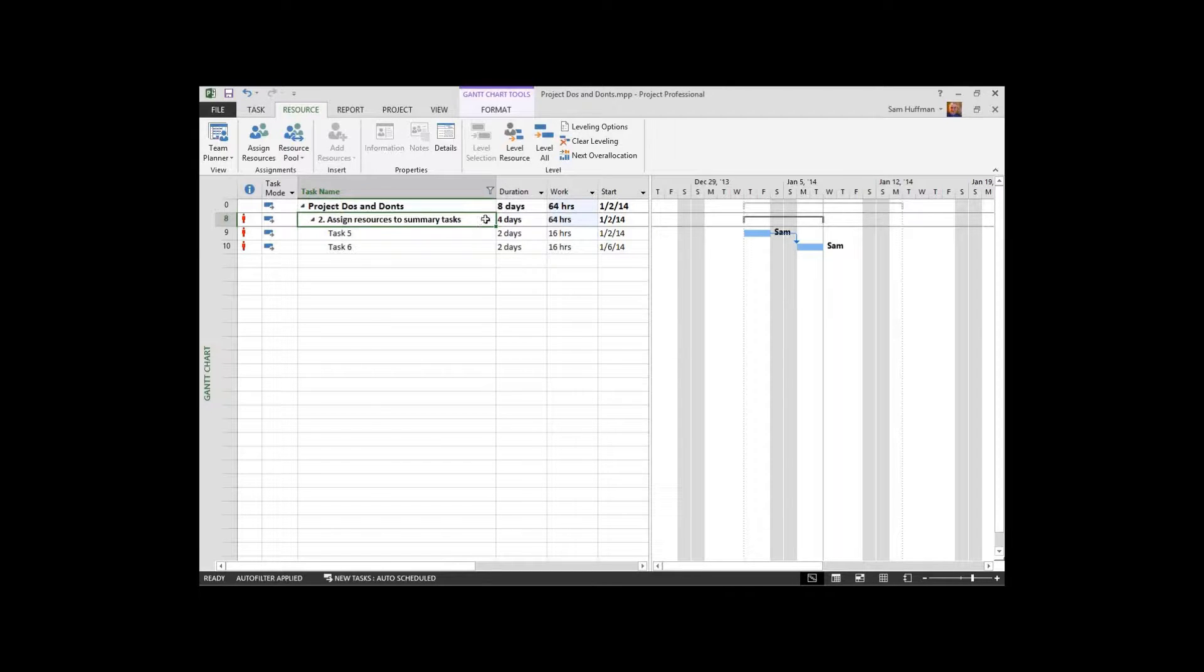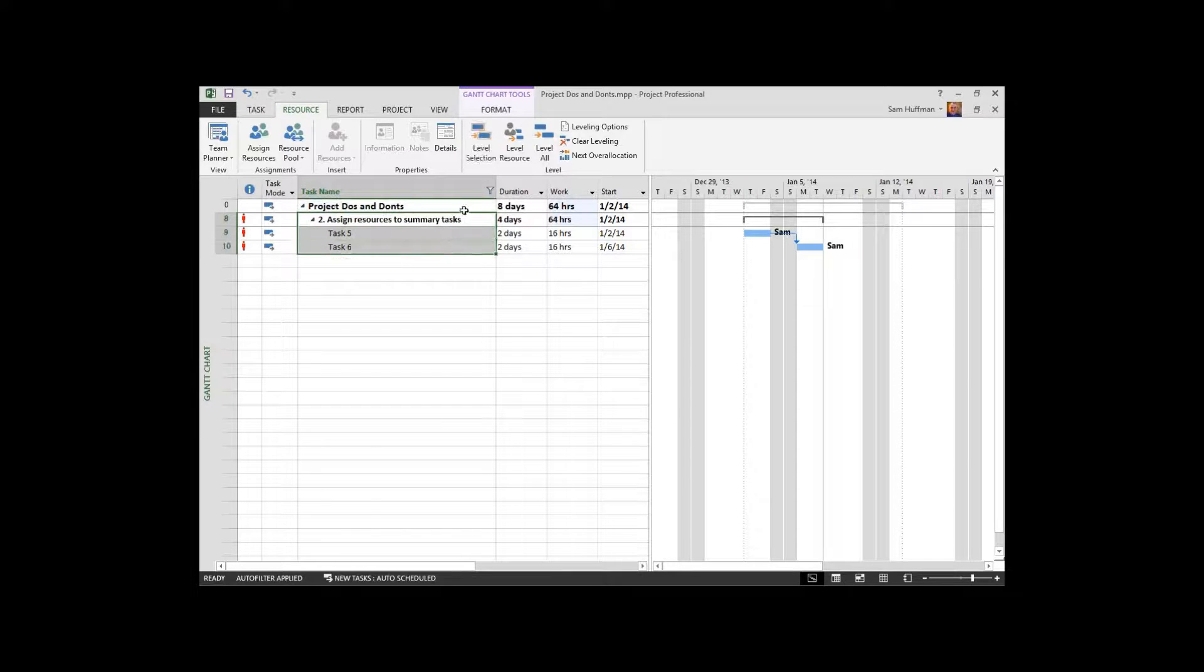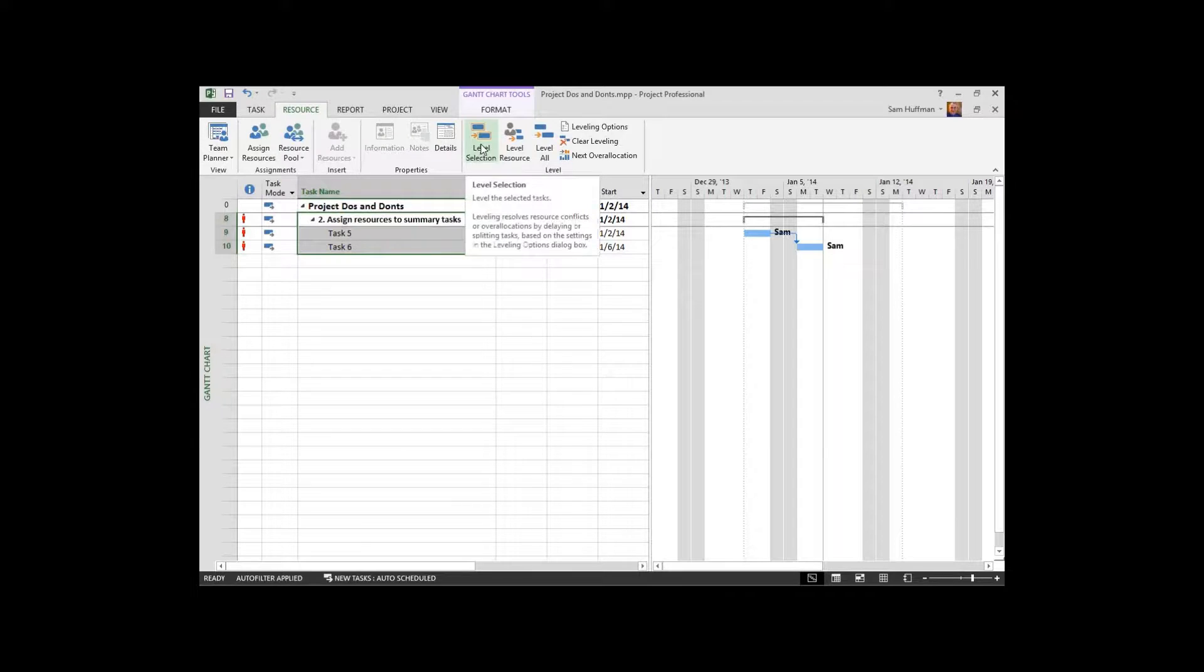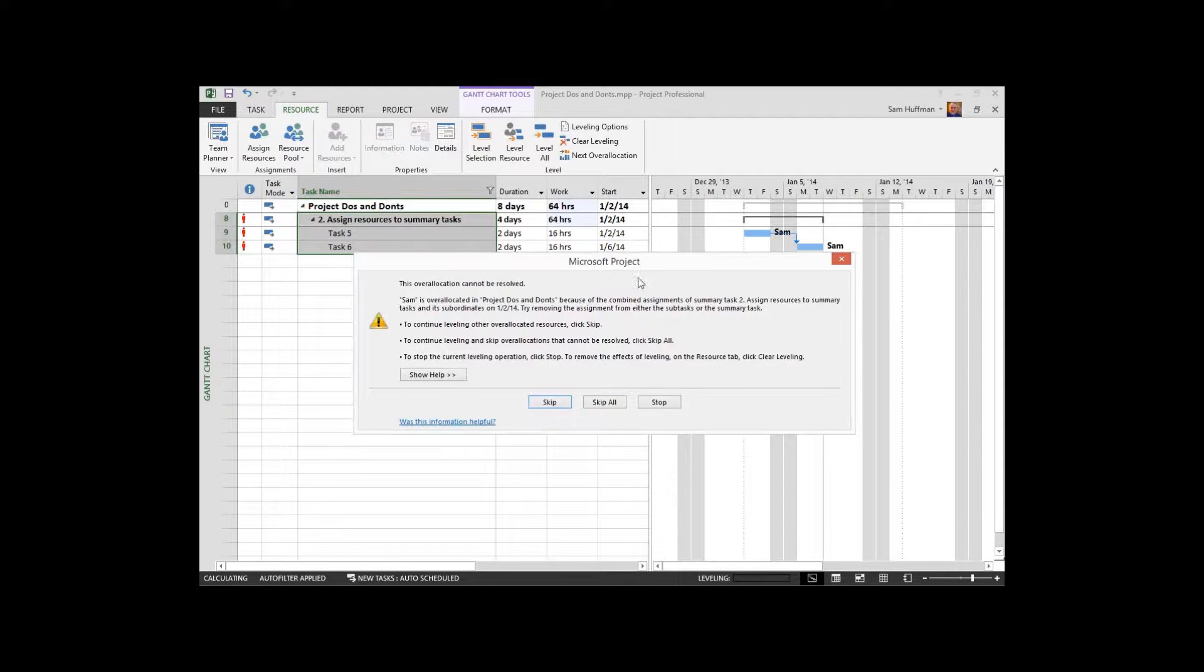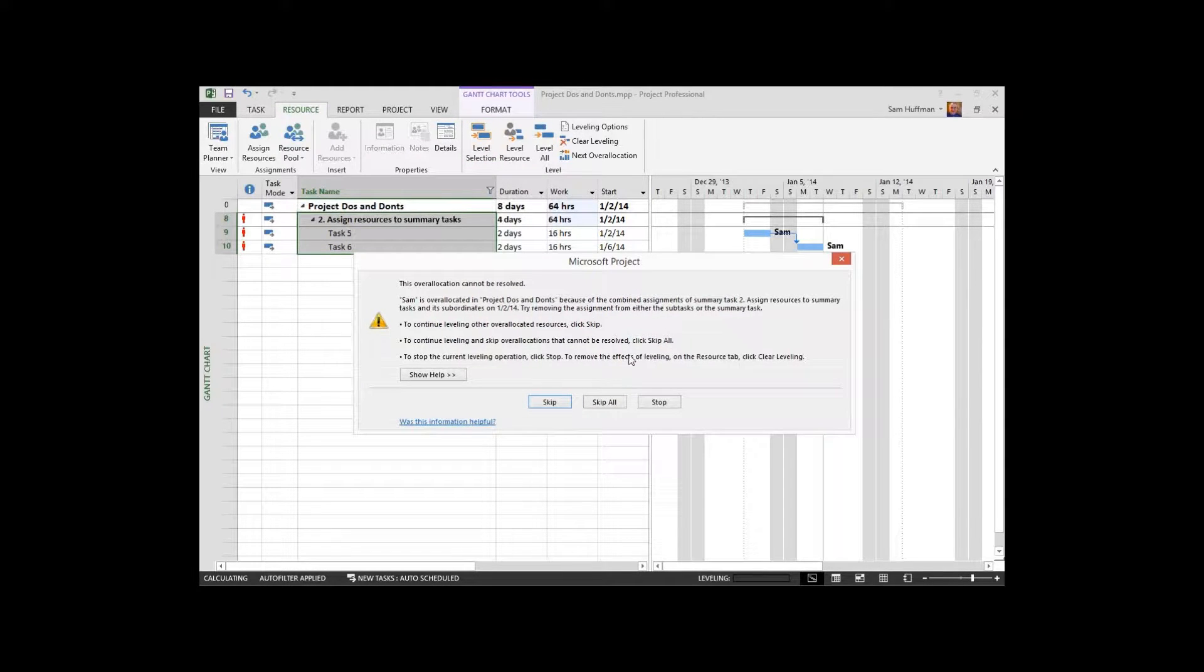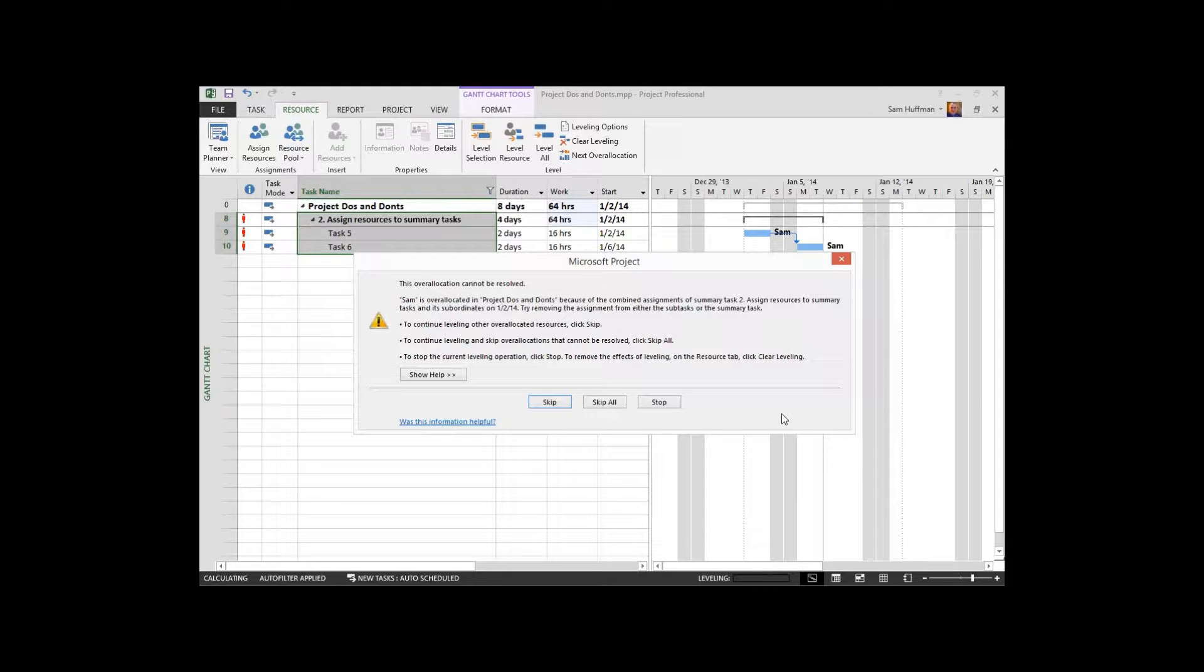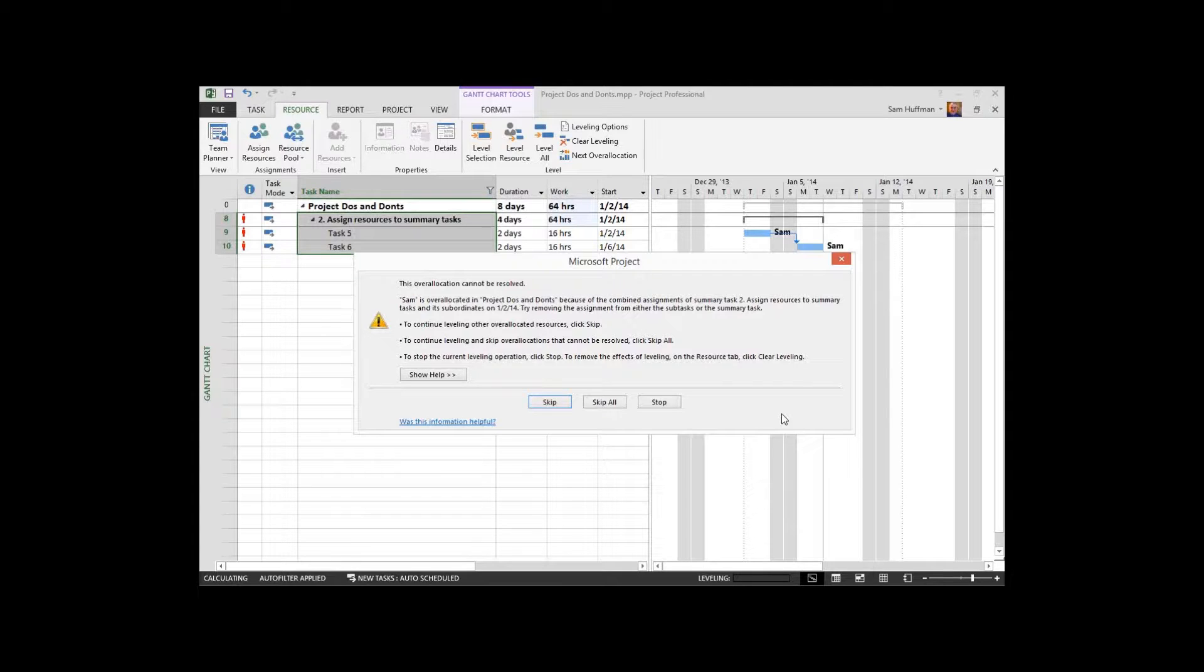Watch this, guys. I'm going to choose my tasks. I'm going to level that selection of tasks. And project will instantly tell me the story. This over-allocation cannot be resolved because the resource is assigned to a combination of assignments and at the summary task level here on the second summary task.